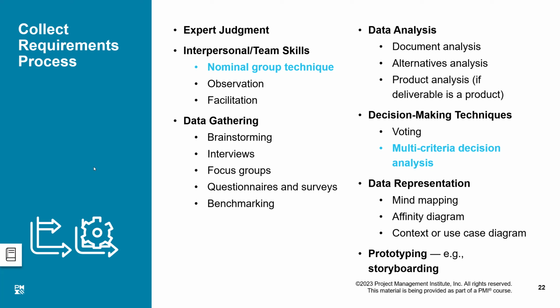Exactly. Okay, what else do we do in the requirement collection process? We do the data analysis. Now we have gathered the data. Now, how do we analyze? Naturally, we do the document analysis. We can look back into the lessons learned register, older records, and things like that. And we can get a lot of data about that requirement from the various sources, and we can analyze them very deeply. It is more like an observation kind of a thing, where we are trying to decide on various requirements based on the data available with us.